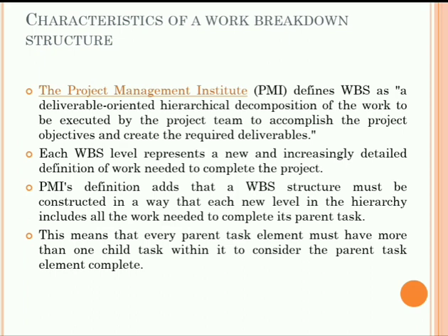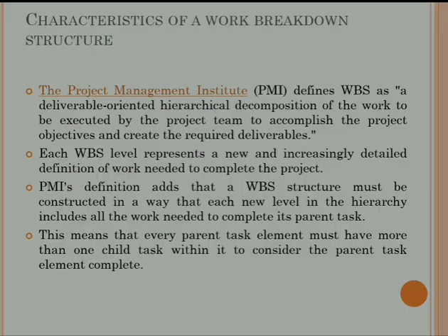The definition adds that a work breakdown structure must be constructed in a way that each new level in the hierarchy includes all the work needed to complete its parent task. This means that every parent task element must have more than one child task within it, and only when those are complete will the parent task be completed within that particular time.